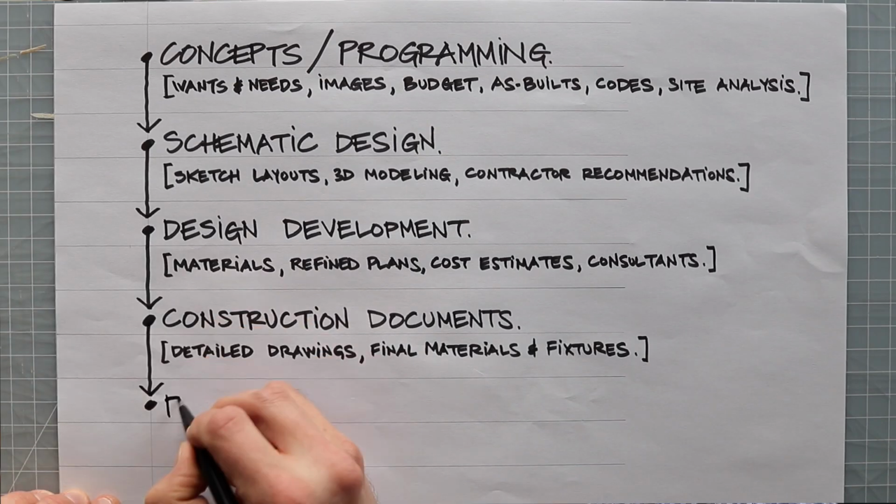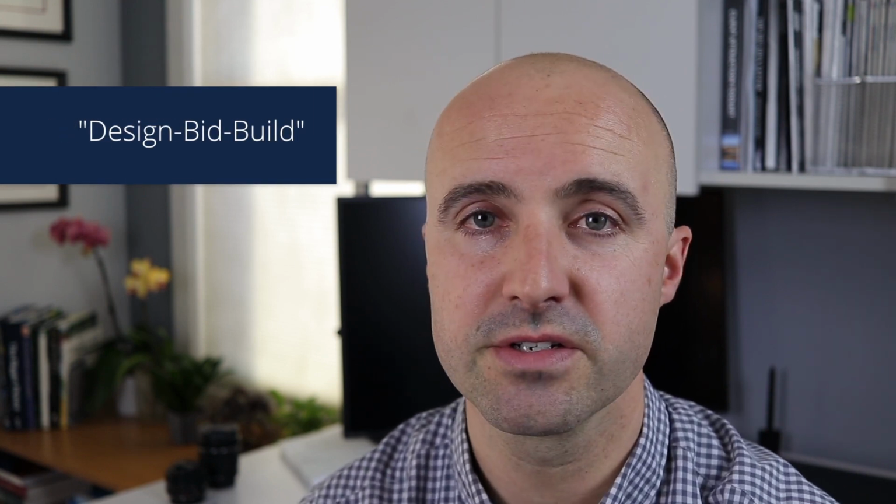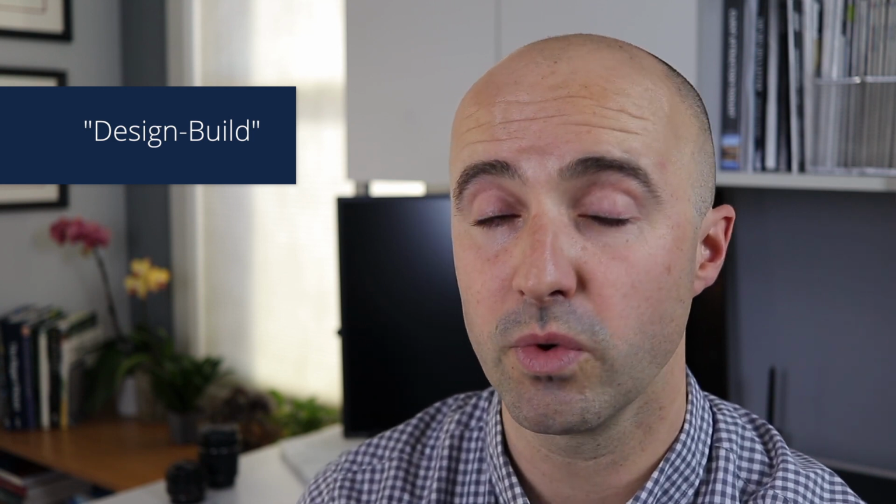And the next phase, of course, is bidding. If you've gone through a more traditional process where you've worked through your plans with just a design team, you should plan to send out your drawings to multiple contractors so you can compare different costs. If you've worked with a single design build firm, where both the design and construction are covered under one contract, this bidding and estimating process would have been going on all along.